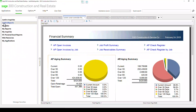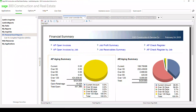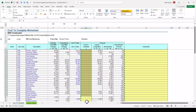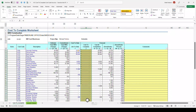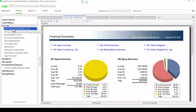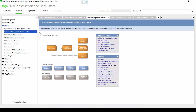Reports can also be written in Excel. This is an example of a cost-to-complete worksheet. When the report runs, it fills in all the blanks. This particular report is designed where a project manager or person responsible for updating a cost-to-complete forecast would type that in right there. So let's move on and talk a little bit more about routine things that a person would do in the system, starting with setting up jobs and so forth.